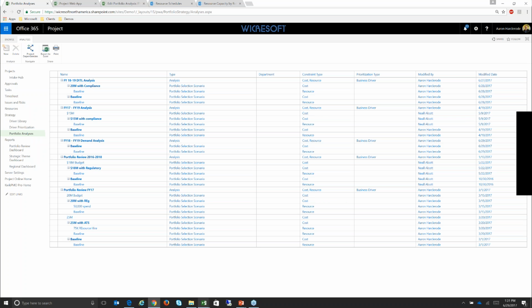Or you might have an analysis that encompasses projects across multiple business units, so a sort of more global portfolio as well. And you can have a hybrid approach where some analyses might contain specific BUs or specific portfolios of projects, and some analyses may include every project that's in the system. Now, I shouldn't say every project, because projects that are closed out, that are completed, you certainly wouldn't want to analyze those. And at the other end of the spectrum, projects that have just been introduced to the system, but you don't have a resource demand modeled for them yet via the resource plan or the schedule, and you don't have any kind of budget established, well, those are kind of premature to pull into an analysis.